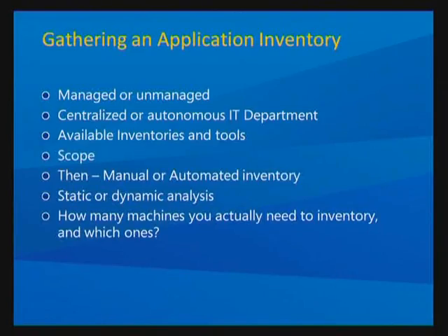If, however, you have a few more people in the wild than you'd like to admit, you need to think about going to a tool like ACT, where you have to deploy the agent, which I know a lot of folks are having issues with. But you deploy the agent, you find out exactly what's on the machines, exactly what the hardware is that you're looking at, and it makes it easier to plan your entire deployment.